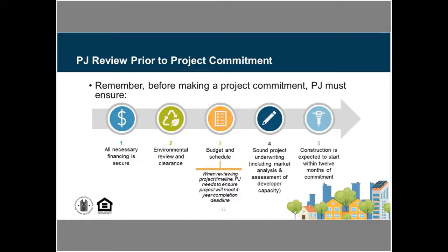We'll talk a little bit more about that in a minute, but right from the beginning, we have established a project timeline, and I'll be talking about later under some of our tracking and thinking about going back to that project timeline that was part of our commitment process and part of that application, to use that as a tool to be able to track, does this project seem to be following that timeline, or are we starting to see some risk here?